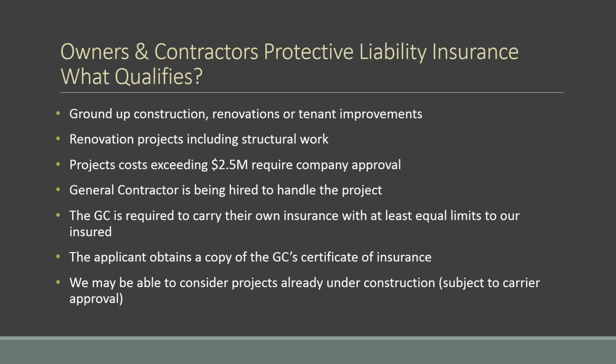A general contractor is being hired to handle the project. The GC is required to carry their own insurance with at least equal limits to our insured. The applicant obtains a copy of the GC certificate of insurance, and we may be able to consider projects already under construction subject to carrier approval, and those are risks that we see quite a bit. They may be written with a standard carrier, and the standard carrier doesn't want to extend them, so they come to us midterm.